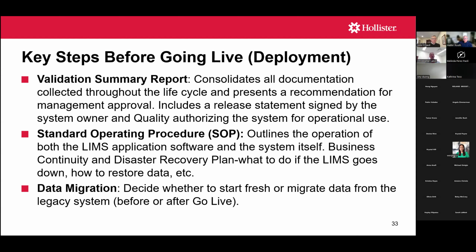So before you can actually go live, a critical thing is a validation summary report. Again, I mentioned you were going to be doing IQ, OQ, PQ. Once all that's complete, you really want to summarize the things that were done. And ultimately, you'll want to have some type of release statement. It's very important that you have the key stakeholder sign off, quality, of course. Basically, it says the validation has been completed and now the system is suitable for use so you can go live.